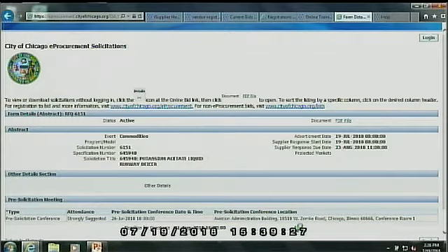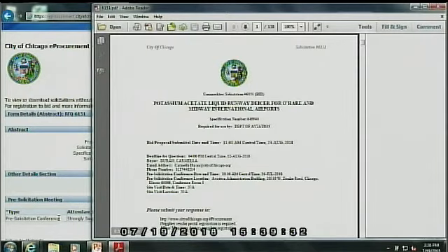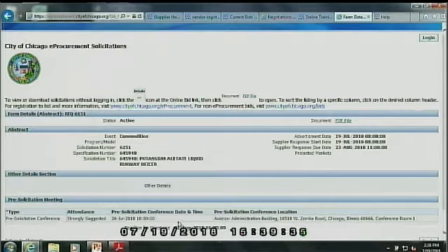We're opening up the solicitation first, but do we speak to the pre-bid? Okay. So, generally, most often, anytime after the advertisement, depending on the commodity and the contract type, there is always a pre-bid. Your pre-bid information is right here, where it says pre-solicitation conference. Attendance is strongly suggested.